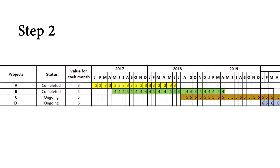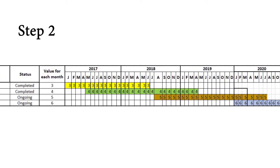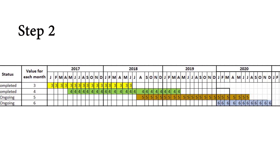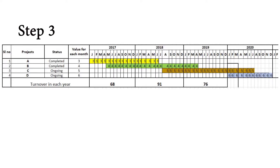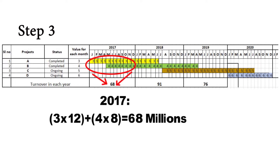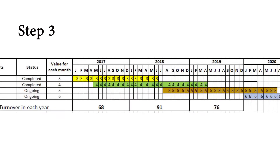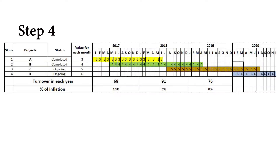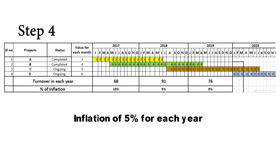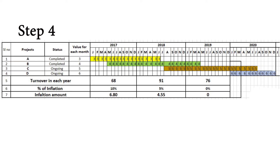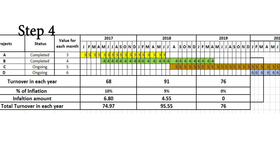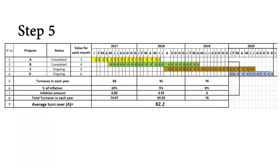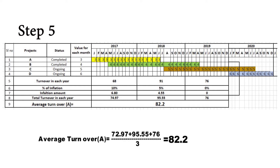Now arrange these projects clearly according to their timelines on the calendar for the last three years with monthly amounts. Step 3: Calculate the annual turnover for each year as the sum of each project's value per month. Step 4: Inflate the value from each year by 5% to bring it to the price levels of the current year. Step 5: Calculate the average annual turnover for the past three years. This is A.